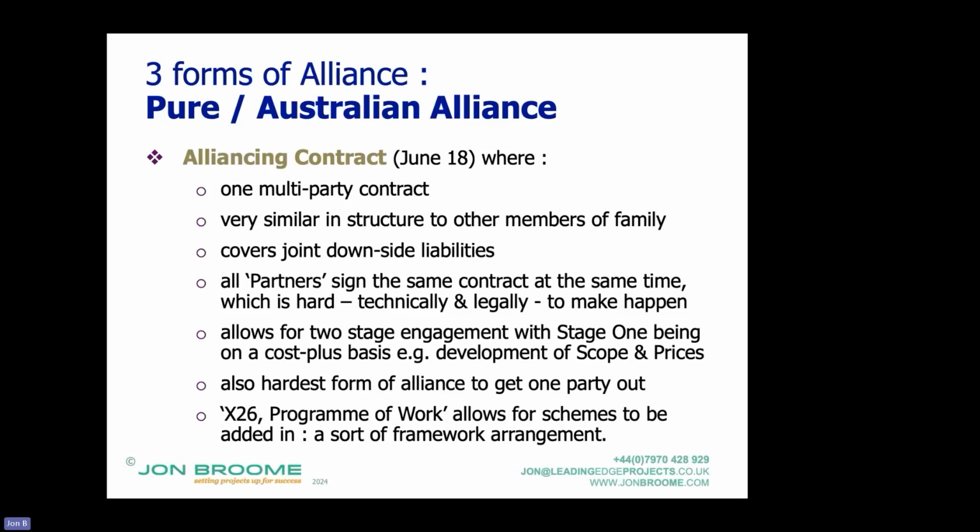That's great if you can make it happen, but it can be hard technically and legally. If you've got a big alliance with 7 different participants in it, you're not going to fully design it, because then where's the ability to work together to add value if it's fully designed? But they've got to be at a similar level so that people can price it up. And all the documents have to be there legally, and you've got to get all the lawyers to agree to it at the same time.